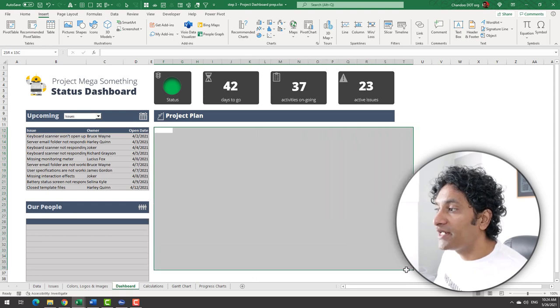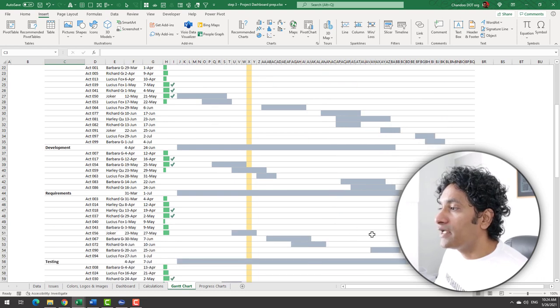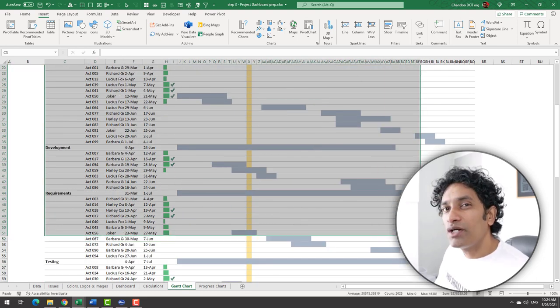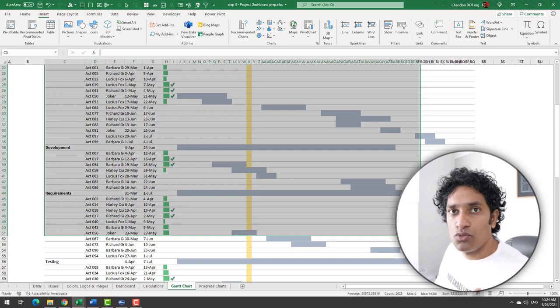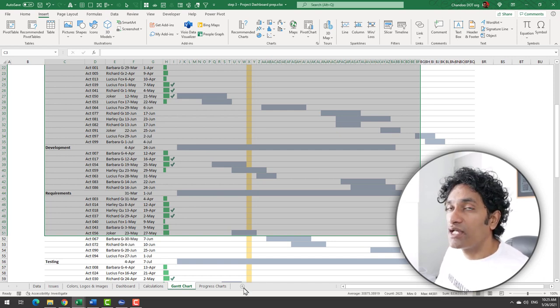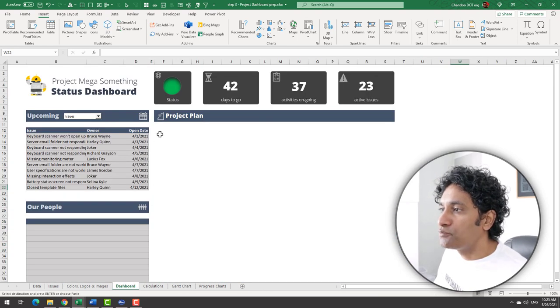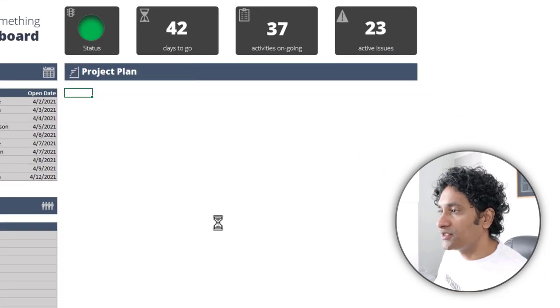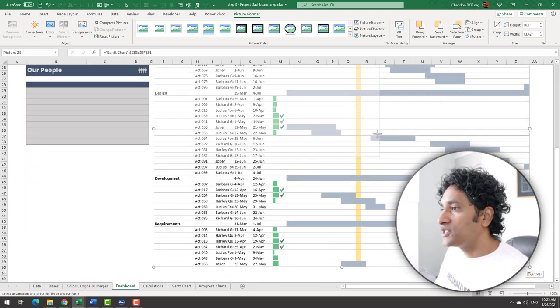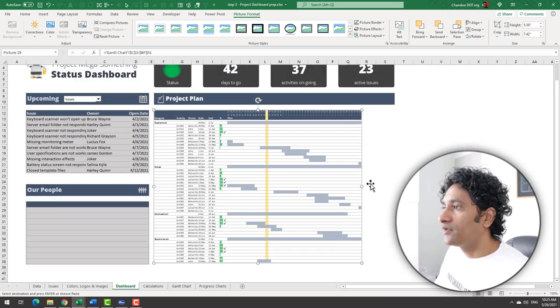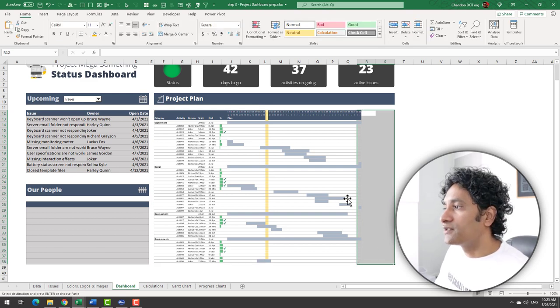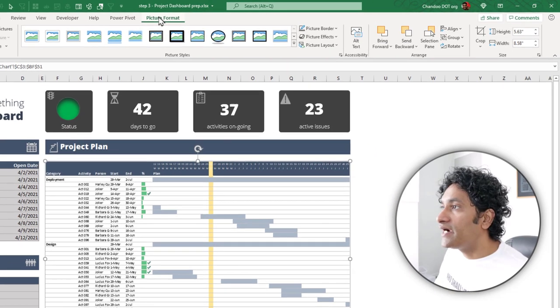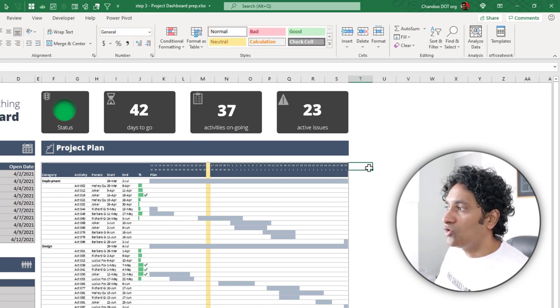Now let's go ahead and get our Gantt chart and load it up here. To do that, just go to your Gantt chart and pick a big enough range to load up in the dashboard. You don't have to load the entire Gantt chart, just load enough rows and columns so that it does give you a context of what's happening in the project. But if somebody needs more information, they can always navigate to the Gantt chart tab. So select this, control C, copy, go to the dashboard, right click and select the linked picture option. This will give you a live snapshot of the Gantt chart here as a picture. Because this is a picture, I can adjust its size and fit it into my layout. If you see some extra space on here or at the bottom, just readjust the picture input range so that it will fit.